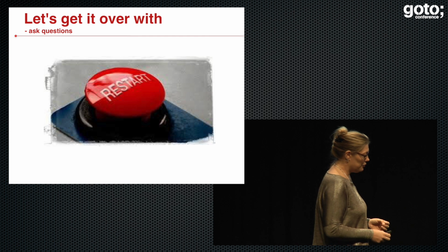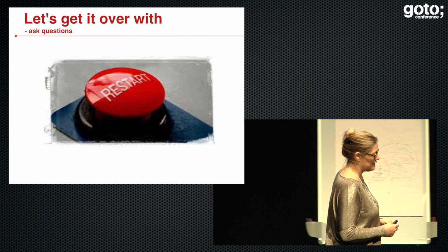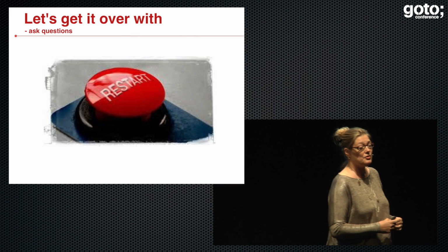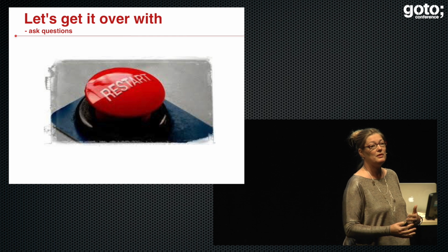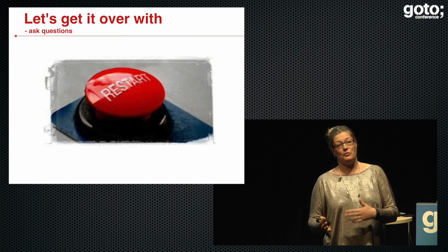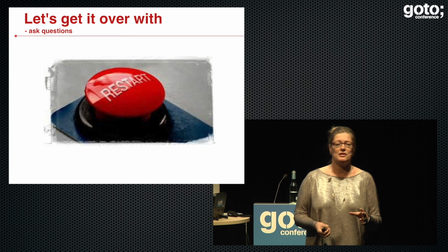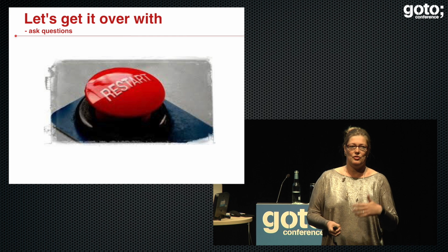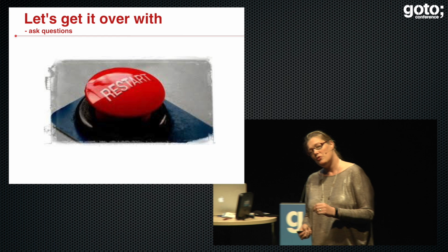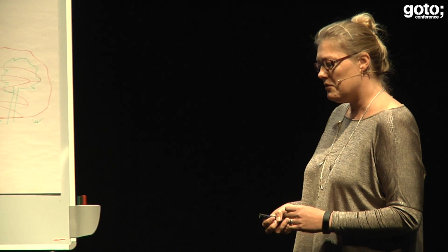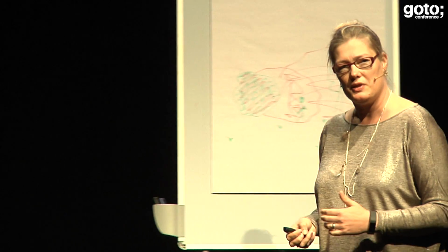And one thing you could do to restart the retrospectives is to get somebody else to facilitate the retrospectives so that you can see what's happening to the people. If you're the Scrum Master or the one who's often facilitating, look at somebody else facilitating the team. Try to find some new activities on the internet or buy a book. But even more important, ask questions. Try to figure out why they think that the retrospectives are a waste of time. But also try to figure out which problems they have.